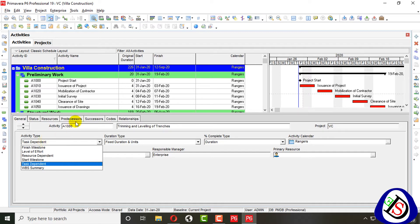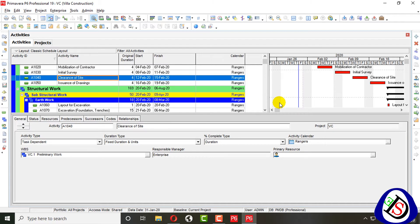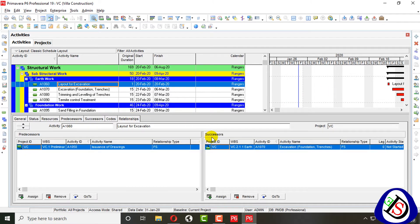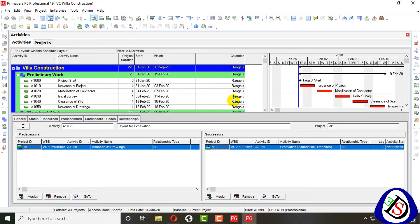In the General tab you can see activity types. The first type is Task Dependent, which is the general activity type. It is based on resources, applied on successors and predecessors, may be affected by resources, and is calculated based on the calendar.